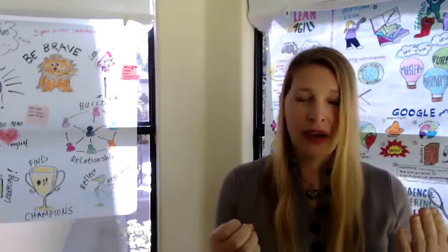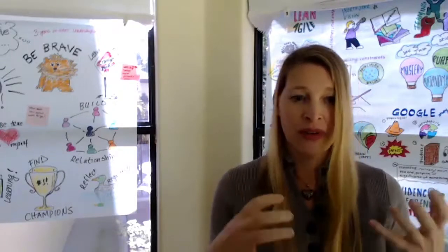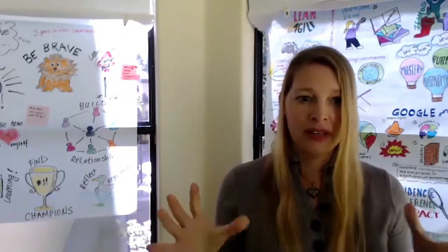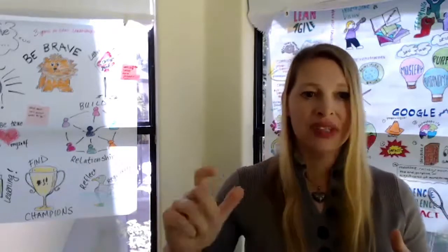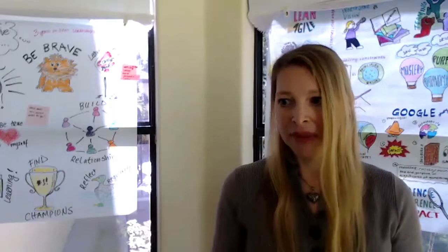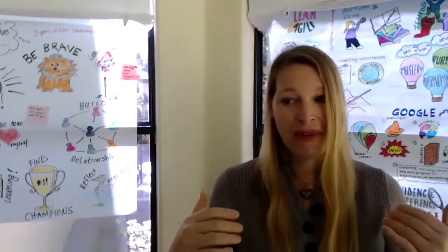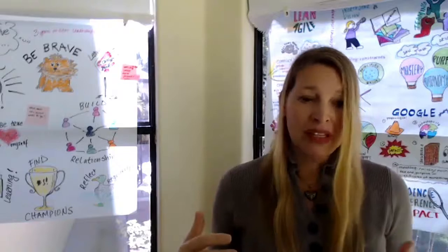And then how do we decide to group them and discover that we have themes? So I had in one company, we set up a Kanban board for teams to add their impediments, and then we grouped them with epics. And that made it really visible. And then last, we have to have a protocol for deciding, once it's documented, who will take those forward.